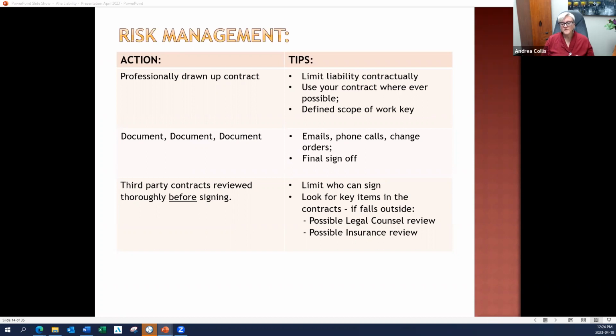And that, therefore, puts the onus back on the client to come back and say, not after the fact, but once they've received your email, oh, that's not what I understood. This should also mean this. And clarifications are there. And if they don't come back to you and you've sent a summary of what your understanding was, it's a lot easier to defend yourself for those purposes.